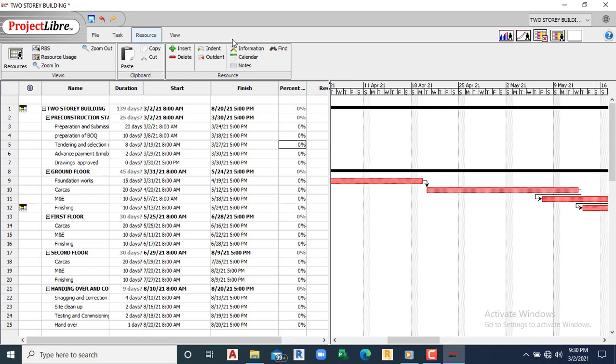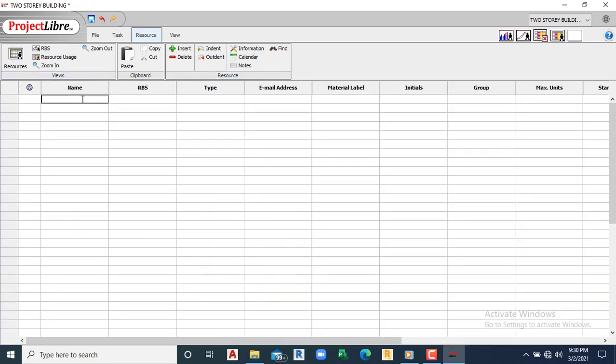You can also add your resource. You come here, you fill in the name of the resource. Maybe it's an engineer. That's just like a code. Basically, we have two types of cost. We have work, we have material. Basically, work is your equipment, your personnel, then the material is those consumables that you use for the project.